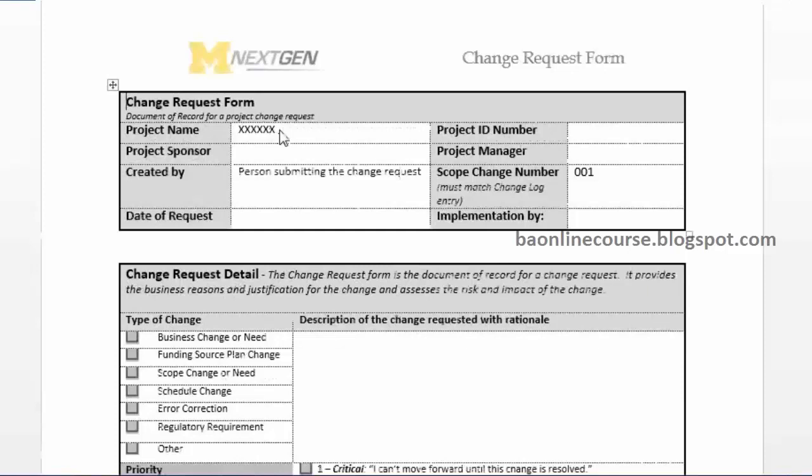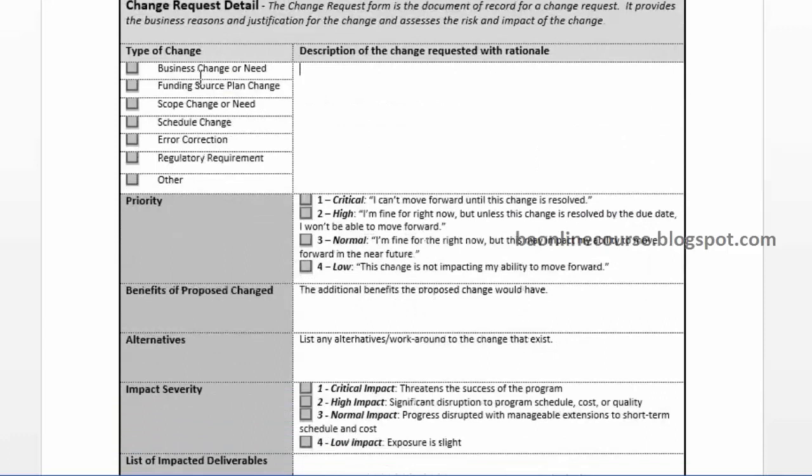So you would have some additional details in most of the cases, like you'll capture the project name, the sponsor, who has submitted the change request, who's the SME, when it was coming in, and the number, project manager, the ID, okay? Then what type of change it is, whether it's a business change, or because of some defect that you're trying to correct. Is it a new regulatory requirement which is coming in, right? What is the priority of it, right? So they will define it also.